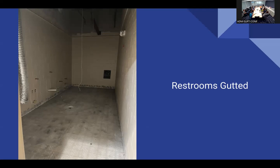So now that that's done, Luke's been in communication with We Energies asking where we are at with this. They hired the subcontractor, and when we met, he committed to the location. But once they turn off and decommission the gas, then the demo can start.